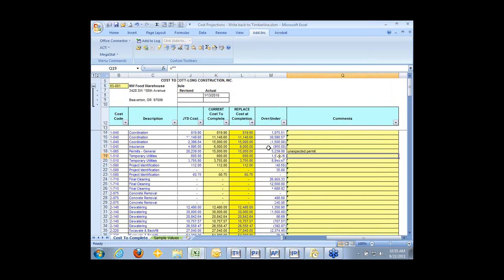So next month, when he comes to do the cost projection, or actually I guess that's backwards because he's making money here, but if he had to mark it up, you'd say, oh, it's actually going to cost $26,000, and now this line item's a bust, and he can put himself a note. So next month when he types the job number in here, all his comments are going to drop in here too, like little notes he's leaving for himself to explain why he did what he did last month.